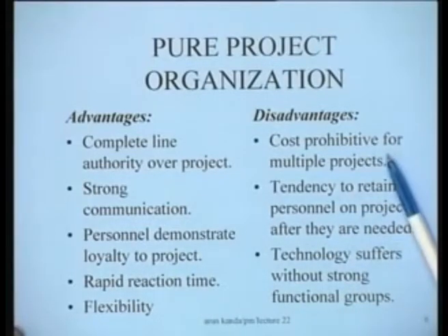The major disadvantage of this particular organization is that it is cost prohibitive for multiple projects. As we indicated, an organization or a firm would be engaged in not one project but a number of projects at the same time. So if you were to set up a separate organization for each project, it would become cost prohibitive.